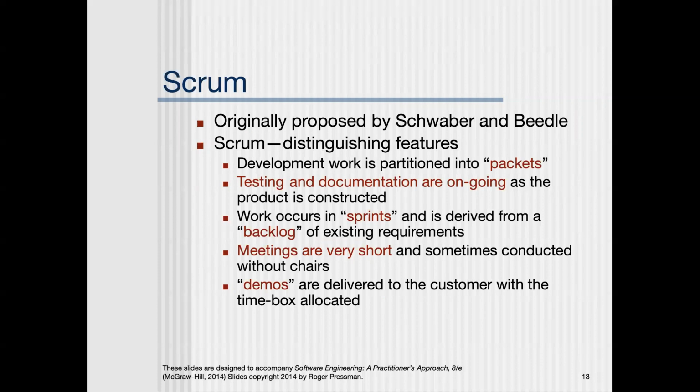You have this backlog of existing requirements. Those get added to as change happens, but you're going to define a sprint. The sprint will be for some period of time. It's a week sometimes, 2 weeks sometimes, whatever it is. And you're going to try to get done all of the tasks, all the packets or whatever you want to call it, that are on that sprint to give a deliverable.